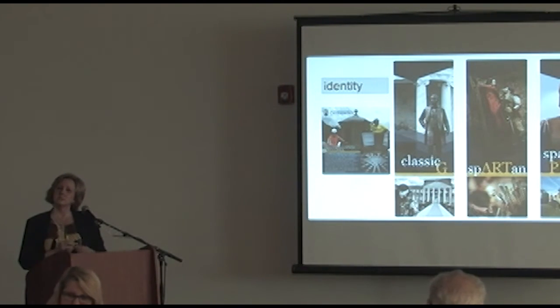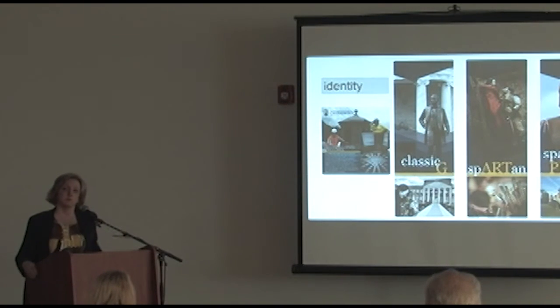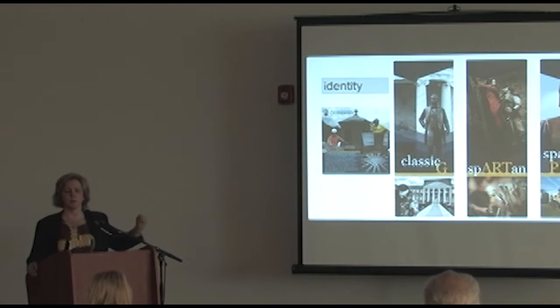Did everything turn out on budget as you projected? Everything about the budget for the parts we controlled did. There was a separate food service contractor that the owner had engaged, and they were not under our or the CM's risk control. I would say they somewhat went off the rails in the very final phase of the project, which held up the completion date of phase four, but not the central part. But the rest of the building, we stayed on the budget we had arrived at.